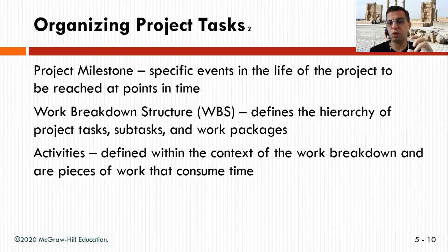And then there is what you call a work breakdown structure, or WBS, which is defined as the hierarchy of the project task, the subtasks, and the work packages. So it divides the one task, and then which one is more important and which one depends on what. You divide it and then you have subtask and work package, as we said. And the activities are defined within the context of work breakdown and are a piece of work that consumes time.